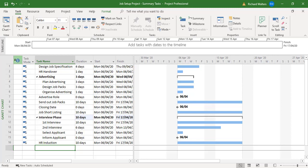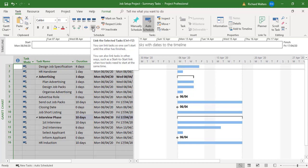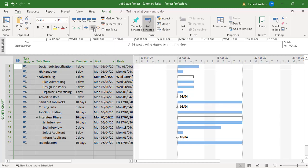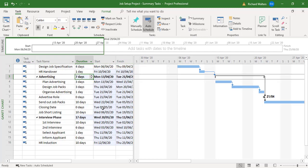We're going to see this change now by linking all the tasks together. To do this I'm going to highlight the whole of the table area in project and just click on the chain to link everything together. Now we can see that advertising has now changed to seven days - three plus three plus one.